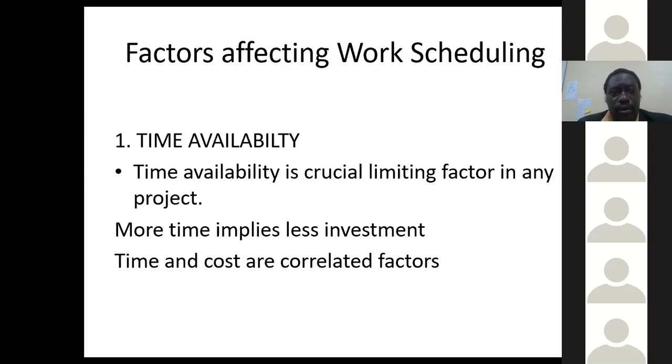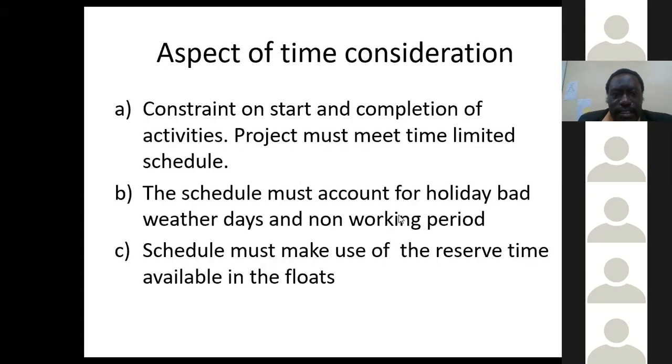So you need to control. Get a hold of your time. Time is a very scarce resource in projects, but people sometimes don't care. So some aspects of time consideration: constraints on start and completion of activities. The project must meet a time-limited schedule. The schedule must account for holidays, bad weather days, and non-working periods.